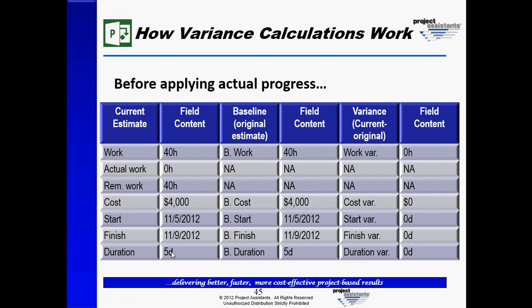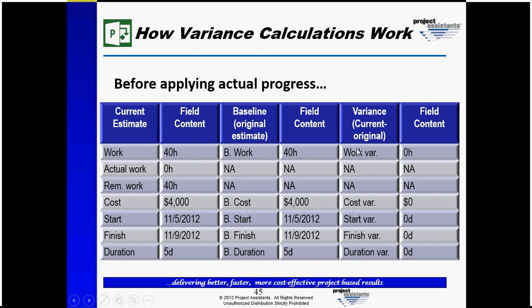Because this plan was just baselined, we also see that the baseline fields have the same contents as the current estimate fields. So the work is 40, baseline work is 40, cost is $4,000, baseline cost is $4,000. The same is true for the start and finish dates and the duration.